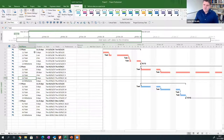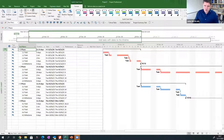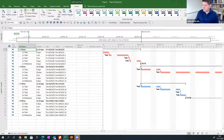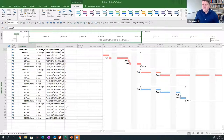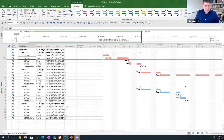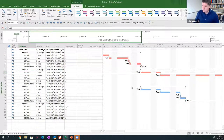The other slightly crazy thing is they never turned on the project row by default. I have a heading for every phase but there's no heading for the project. There is a row zero in Project but you have to know to turn it on. Go back to Format and turn on Project Summary Task — and now row zero appears giving a rolled-up summary of everything. You can't use MS Project with a default schedule out of the box. In fact, we have a unique number on the left section — the bit that looks like Excel — but we don't have unique numbering showing on the right Gantt side. There's loads of room to put it in the task bar: Format, Bar Styles, go to Inside, press 'W' to find the WBS field, and now I have a unique identifier on each item.